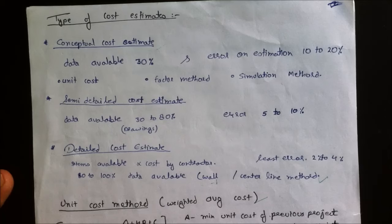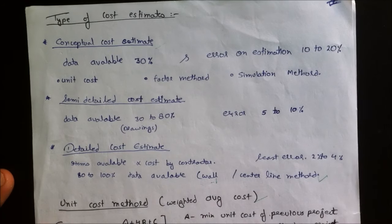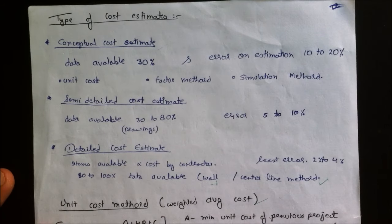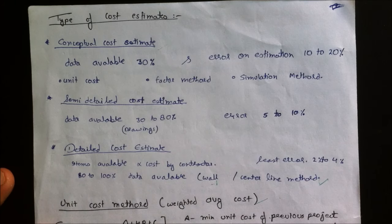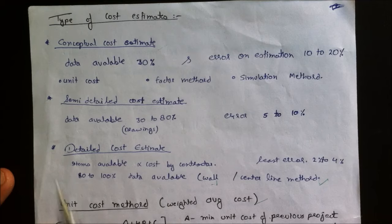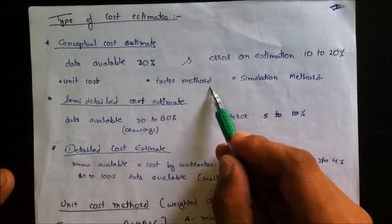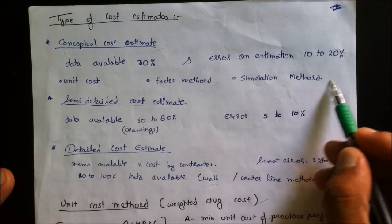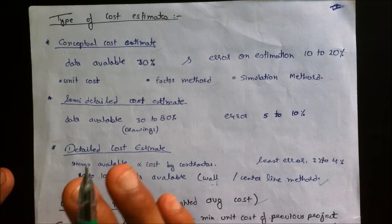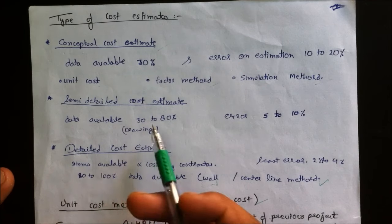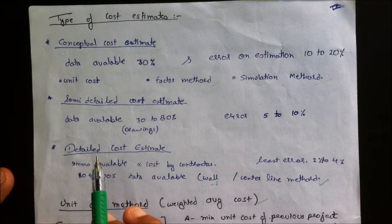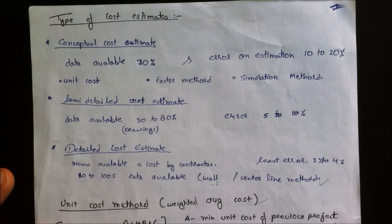There are three types of cost estimates. The conceptual cost estimate applies when data available is less than 30% and the cost estimation error may be 10 to 20%. Methods used include the unit cost method, factor method, or simulation method. Semi-detailed cost estimate applies when data available is 30 to 80%, including drawings, sheets, and construction methods.